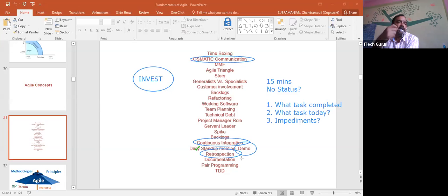You know what happened? You introduced me to this process, right? That means Narendra's process should be followed continuously. Or if something is not working, then I will not pinpoint Narendra or Neelakandan. I need to pinpoint what did not work. This is very, very important. The retrospection aspects should be driven by the Scrum Master, but the mistake should not be pinpointed towards a person. What we need to do to avoid the mistake, that's what we need to do.